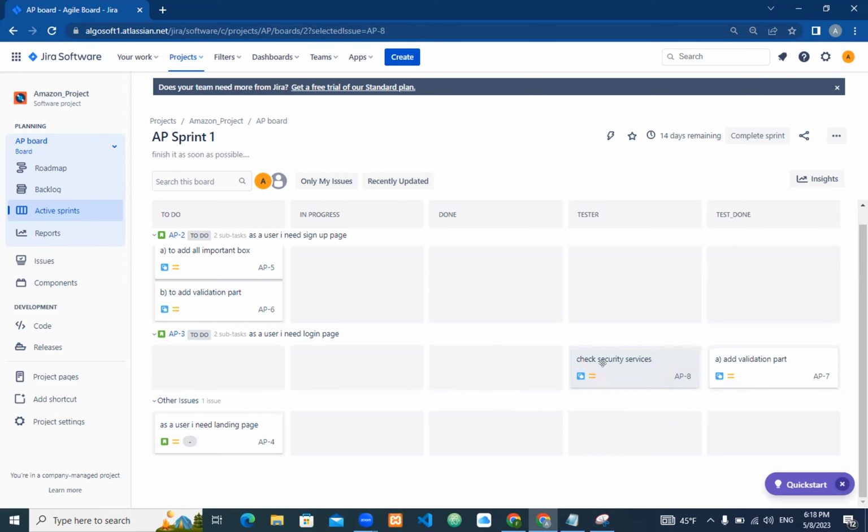So right here, what is the duty of Inayat Nuri? The duty of Inayat Nuri is to report this bug to who? To their team leader, to their test leader. It is the duty of the test leader or Scrum Master to talk with the development team and tell them, hey, we encountered a bug in this section. They will grab this one and put it inside the in progress section again, which means they will recheck it and redevelop it again.